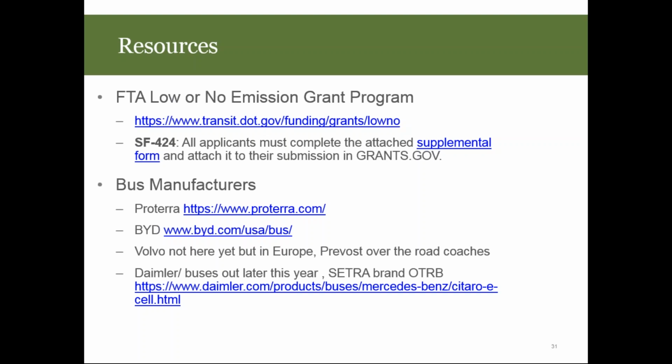It took us that long to get our legal team to understand that we actually partnered and that the Lono grant allowed us to do that. They just didn't want to hear that, and so we had to do a lot of working with them. So I think I would have brought them on board a lot sooner.